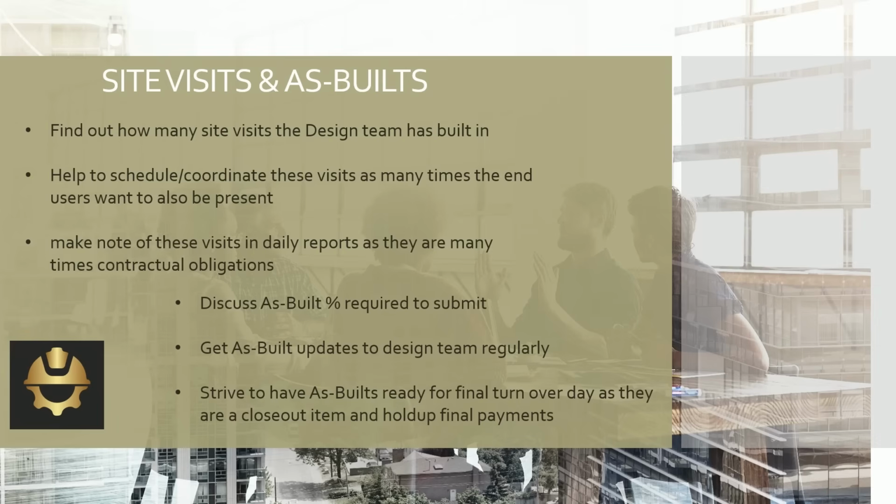And on the feds, usually they tie a portion of our retainage to the as-builts. So if you are not able to turn over your final as-builts the day of project turnover, your company is not able to send that final bill in for your final amount, and they'll hold your money. They hold the money of your employer, and that's a big one. We always teach our QC managers to strive to not hold that up.